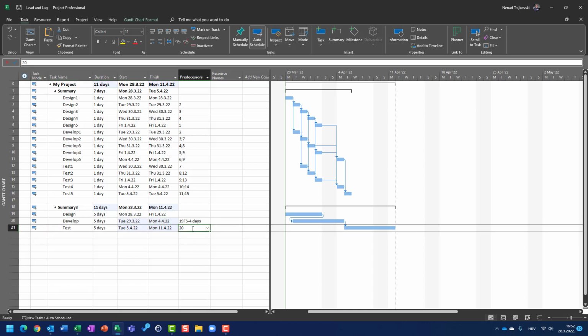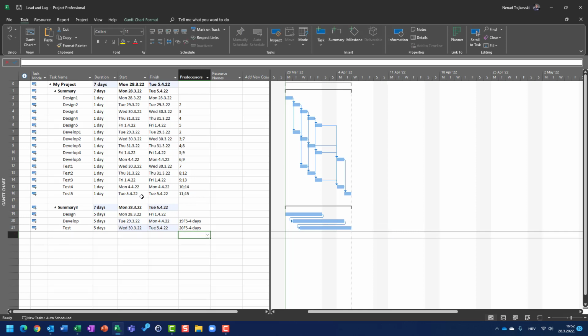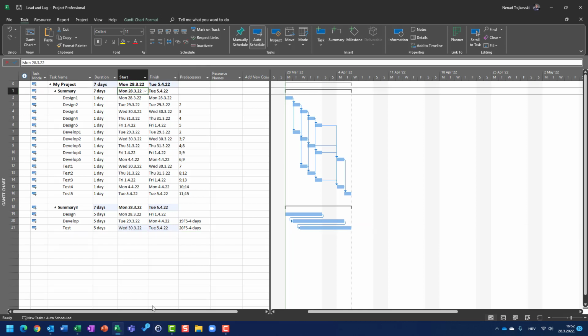Okay, so here I can say that testing will be started 4 days before develop is finished. So I will say here 20 finish to start -4 days. Great. And I will have the same result like here. 7 days, 28th of March is start date, and Tuesday, 5th of April is finish day.